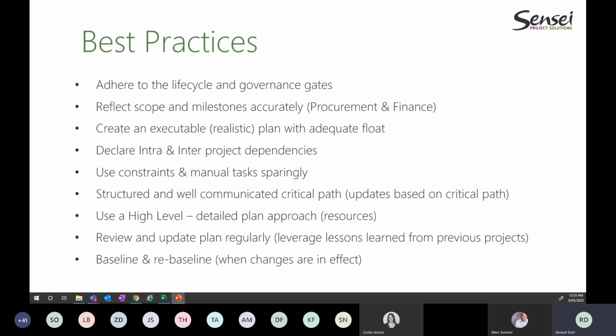Your project progress update, specifically a commentary behind the reason why your schedule's not sticking to plan, becomes a bit more challenging. And finally, the baselines, as I showed you, ensuring that you're rebaselining and doing it when you have CRs and communicating that is quite important, and having that traceability of what your baselines were over the last several months.